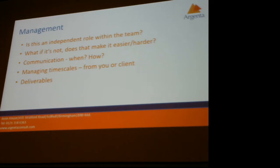I think something like Jira is great for day to day, but you still need something like Smartsheet or Project on top. Maybe once a week you look at Jira, then update the big view so you can understand where you are. Ideally, use them in tandem, because Jira is too in the weeds. You're going, I've got this issue, I've got this issue. No, I don't care. Are we behind?